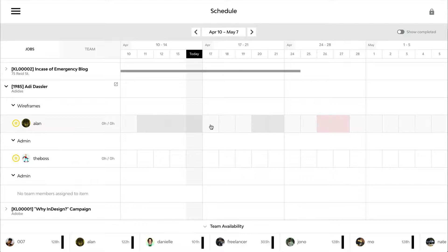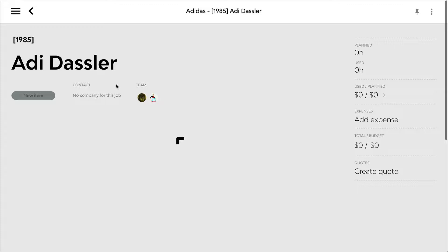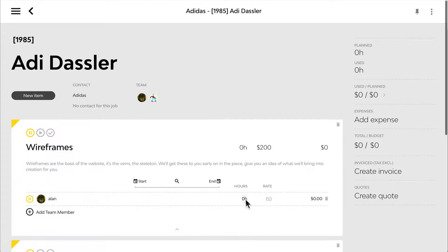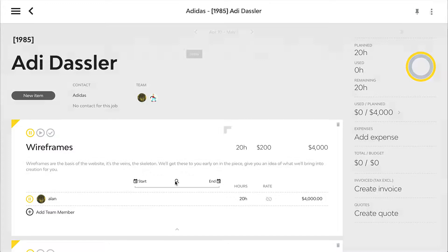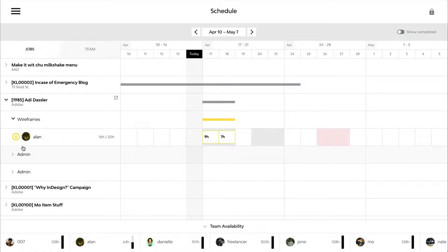The idea is that when the Go button is hit on this job, you can assign out what you want to do with these team members. You can see I'm hitting a capacity problem with Alan because he's obviously booked out on those days. So I can assign things until I hit maximum capacity for Alan — getting the most from him to complete this particular item. If I go back to the job and look at the item, I'll allocate 20 hours on this one. You can see the 20 hours set up on the job, and here's 16 hours made up of the 9 plus the 7 assigned for Alan. This is in the yellow pause state, so Alan can't see this on his to-do list yet. When I'm ready, I just hit play over here.